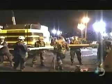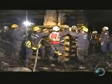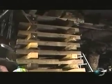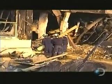Using a shoring system known as a box crib, they built huge columns that were 6 feet square and 14 feet high. All the shoring we used in the Pentagon was all 6x6 dimensional lumber. And we ordered them actually from Home Depot. They delivered, I believe it was 20 tractor trailer loads of 16-foot 6x6s.